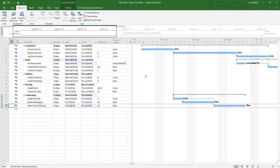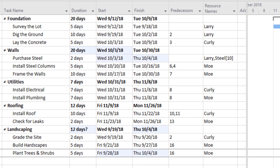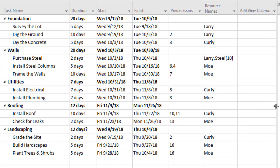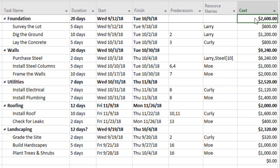Now that I've made several resource adjustments, I'll adjust the Gantt chart view to see the entire project by going to the View menu and clicking Entire Project. Next, I'll move the separator to the right and add a Cost column by typing in cost and selecting it. Microsoft Project now calculates the estimate based on the duration of activities and the cost of the assigned resources, rolling up those costs to each category.